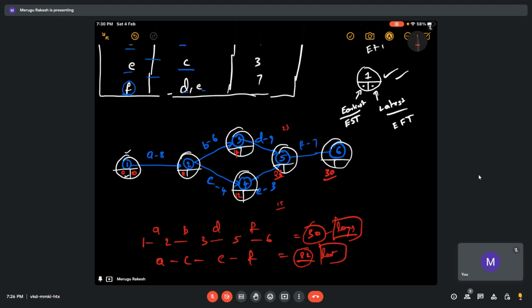If you complete in 22, then 8 days of work is lost, because the longest path is the minimum time for completion of the project. So whatever time you take that is less than this will always underestimate your project. Now let me explain how.